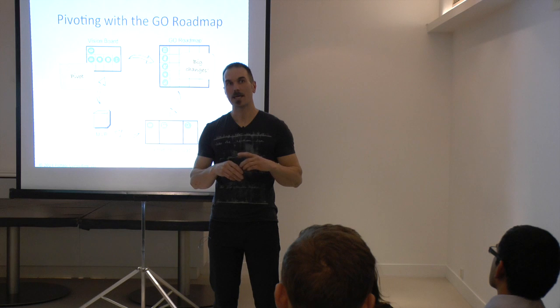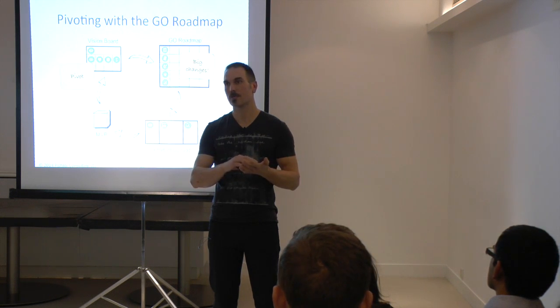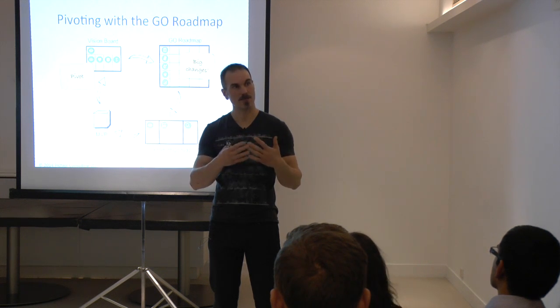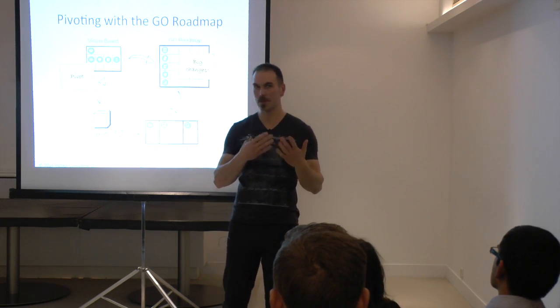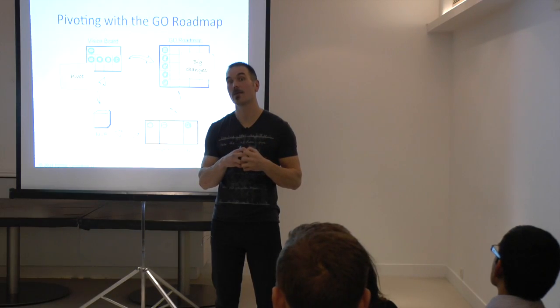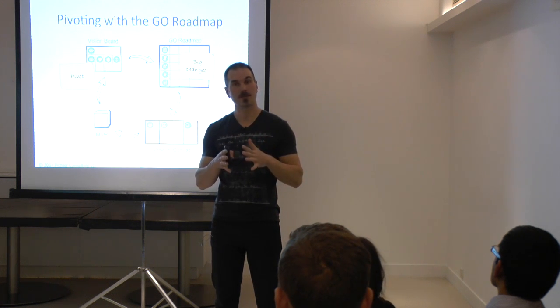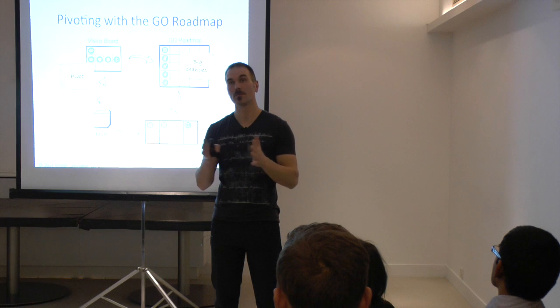On the other hand, it can be beneficial to establish a steady innovation cadence, like a major release at a fairly fixed rhythm every month, every 2 months, every 3 months, so your customers and users know when to expect a bigger piece of new functionality or some bigger changes, and if necessary, they can prepare for it, so that they're not surprised. But I don't think there's a specific rule around what release cycle you should choose.